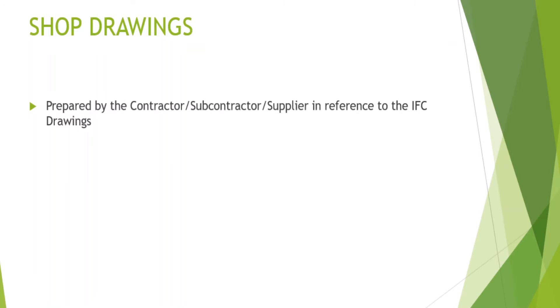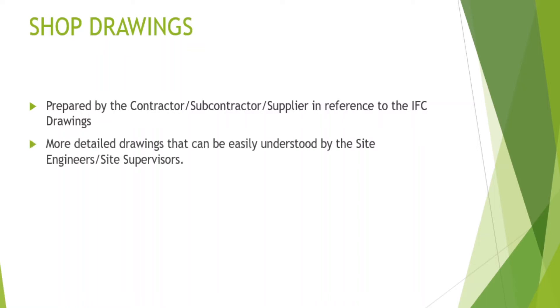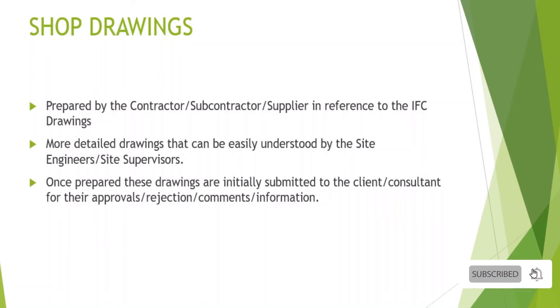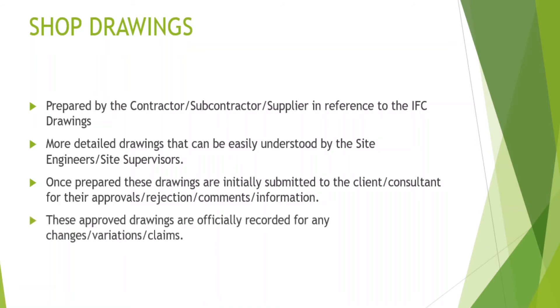Shop drawings are a set of drawings that get formed in the execution stage. These are prepared by the contractor, supplier, or subcontractor, keeping the IFC drawings as a reference. These drawings are more detailed and easily understandable by the site execution team. The shop drawings need to be approved by the client or the consultant for them to become an official document during the execution stage. The client or the consultant needs to give their approval, comments, information, or rejection for each drawing. These drawings become a supporting document for variations or claims if any.